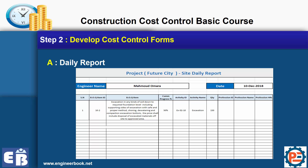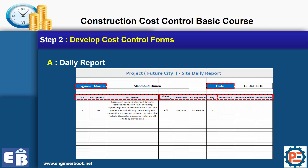Here is the daily report — how it looks like. It's very simple and contains only the information we need from the site. We need to know the engineer name so we can group reports by engineer name later on. We need the date, the BOQ item description, the progress, and activity name. And here is the most important thing in cost control from the site — we need the manpower.